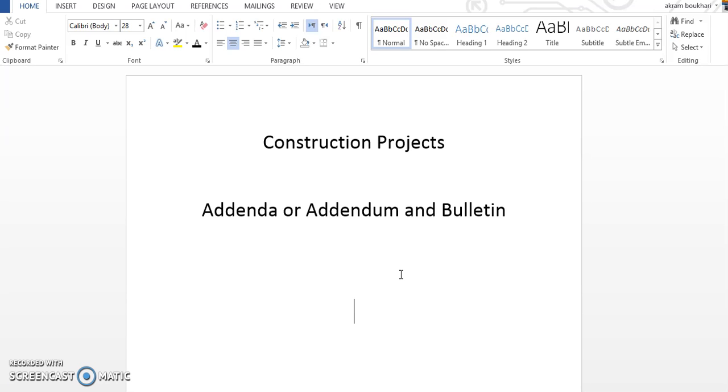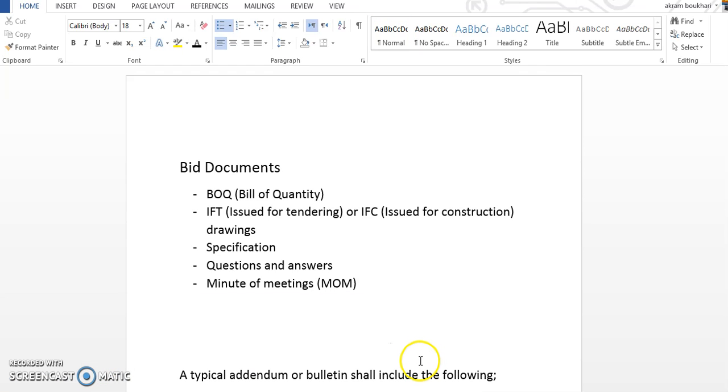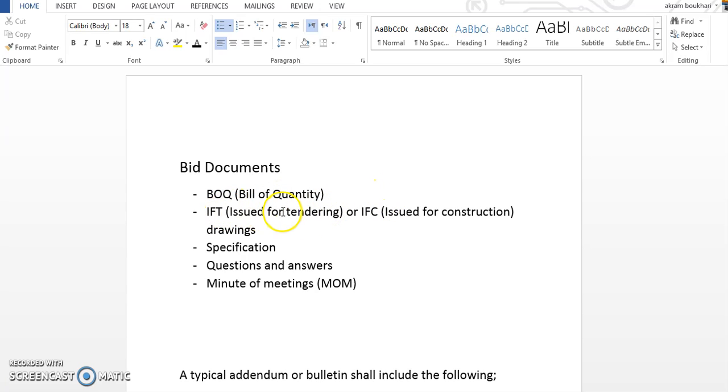Usually, whenever there is a new project, the bidders will be given construction documents for bid. These construction documents mainly consist of the following: BOQ bill of quantity, IFT issued for tendering drawing, specifications, question and answer, and minutes of meeting to start his bid.